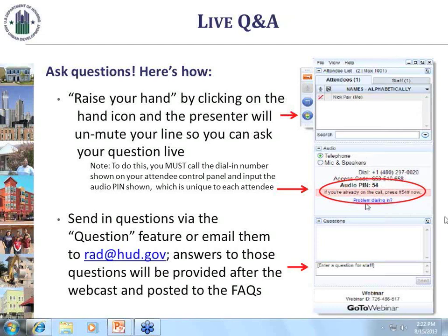So yes, you can use public housing funds for eligible pre-development expenses prior to closing. Our deal is, for every project, there's a first $100,000, which you don't have to ask HUD for any approval to spend.